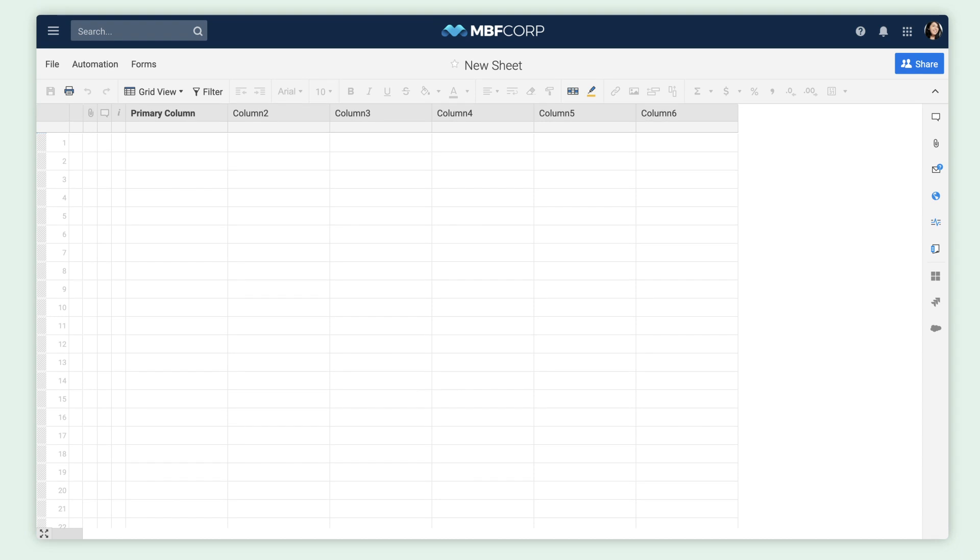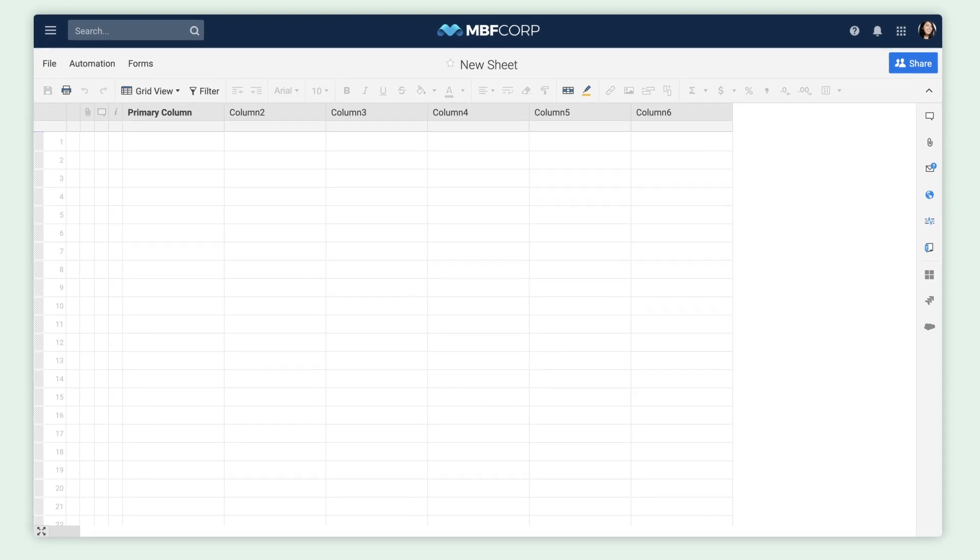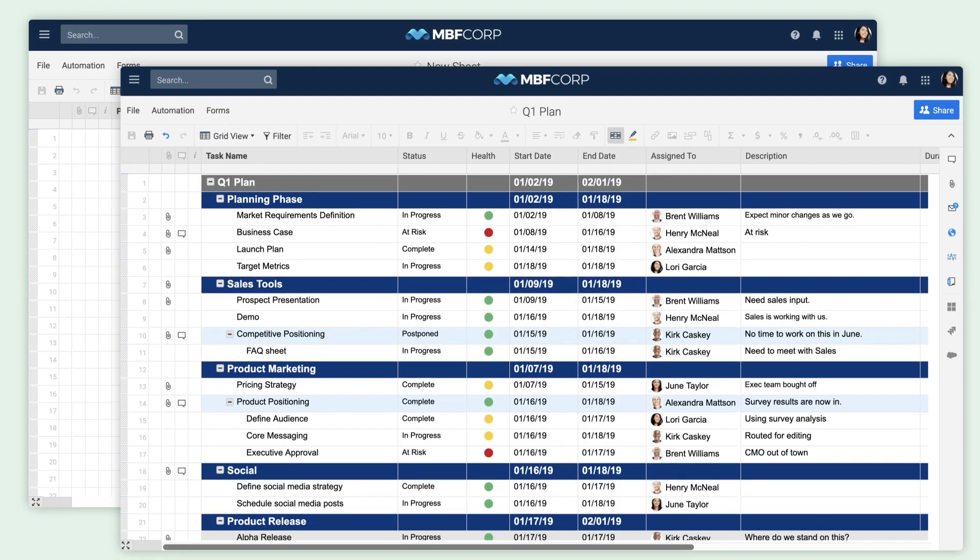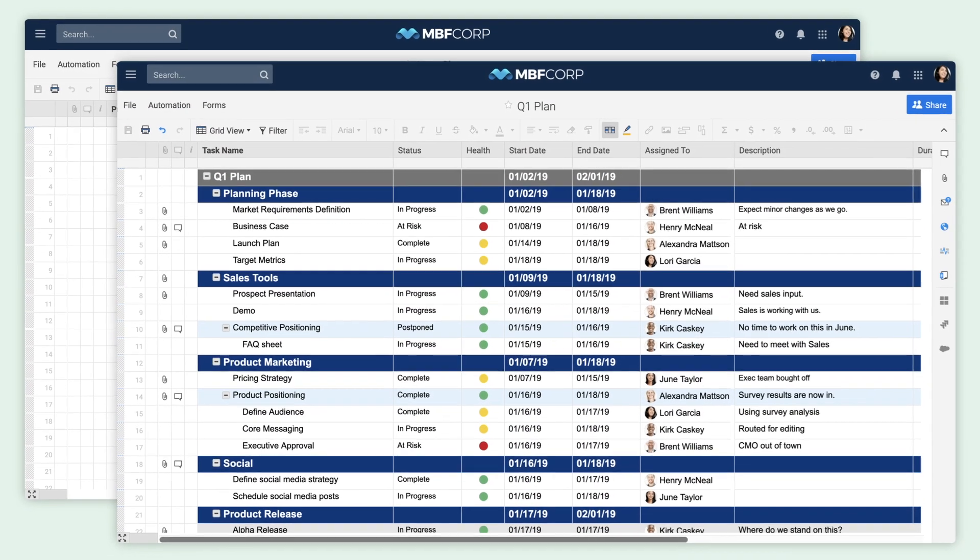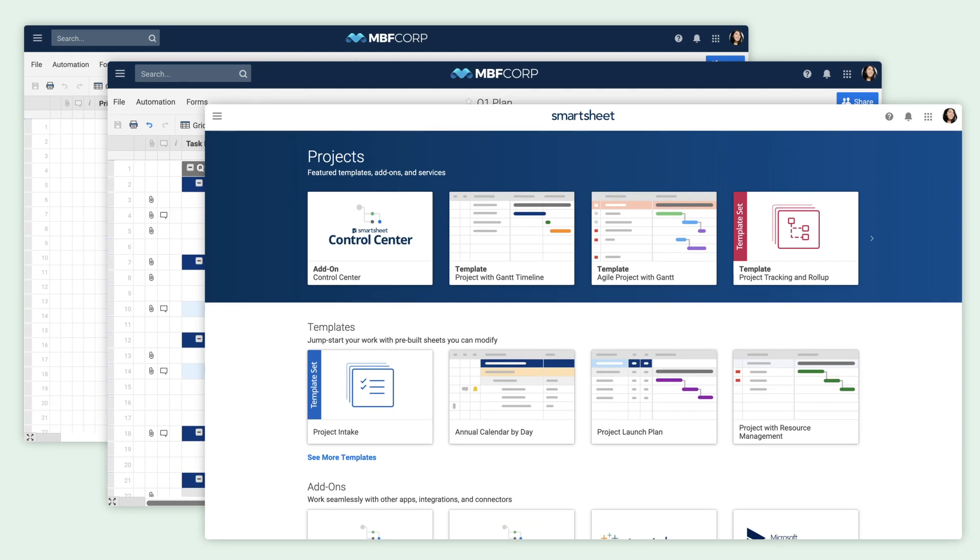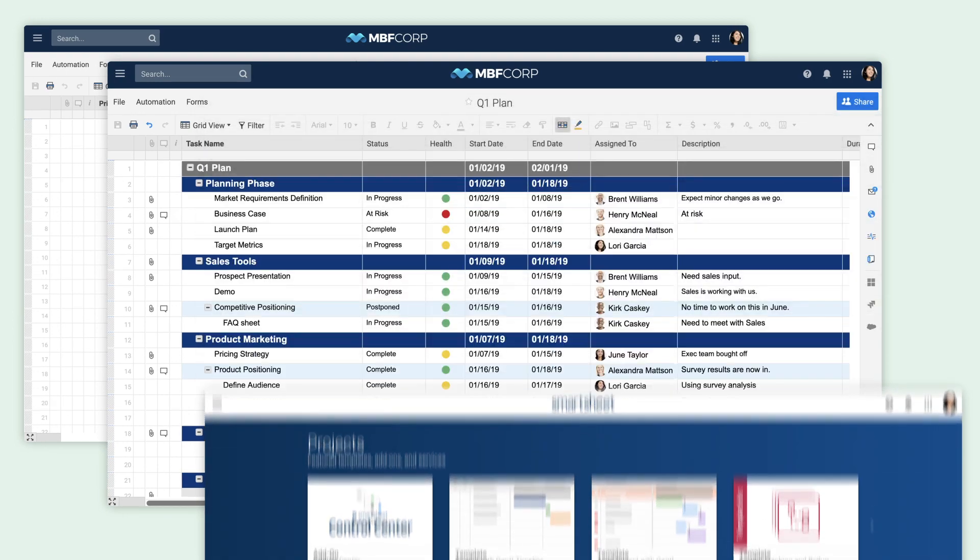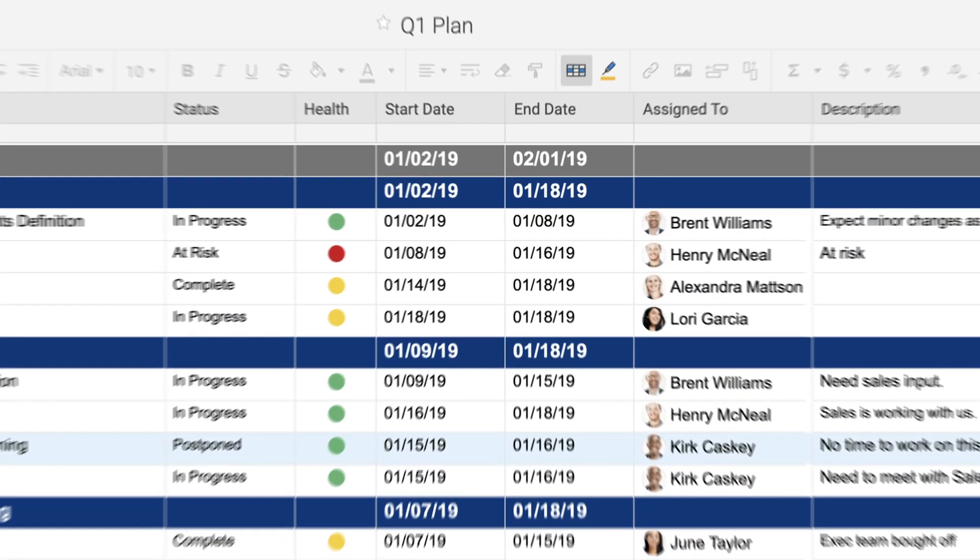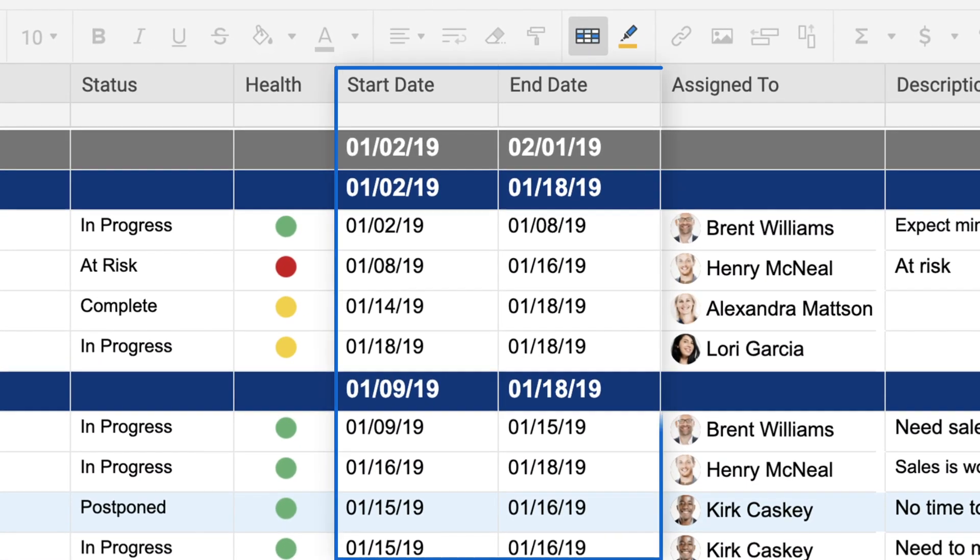You can create a Gantt chart in Smartsheet with a blank sheet, an existing sheet, or a pre-built template, as long as you have two date columns: a start date and an end date.